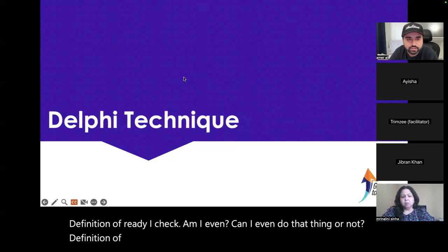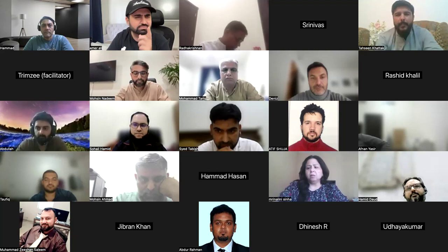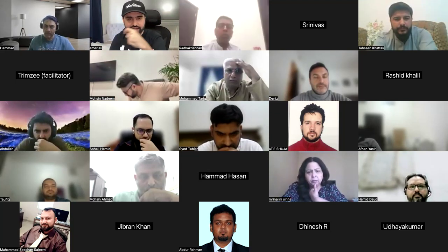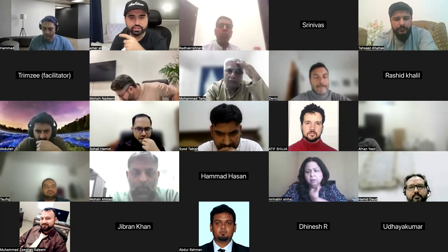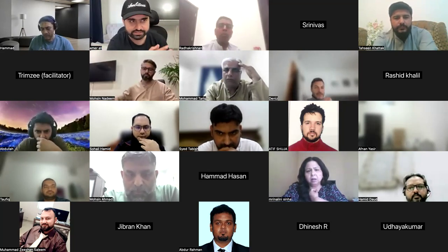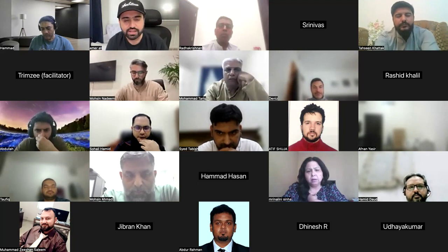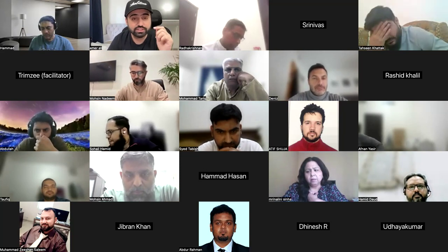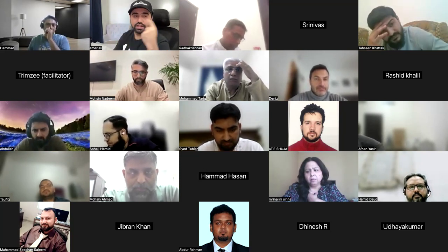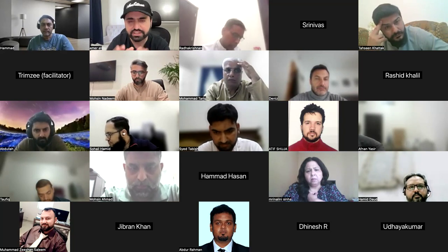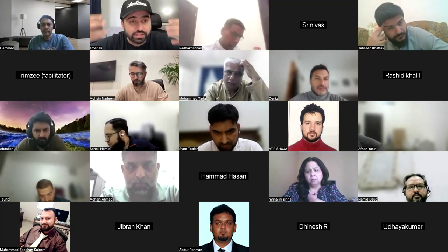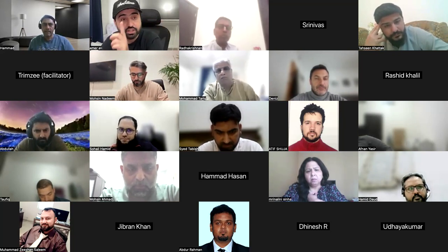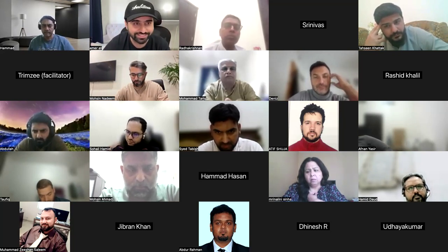Delphi technique. Somebody asked me yesterday about the Delphi technique. Delphi technique is where you go anonymously and ask everyone about it. Anonymously getting the consensus. For example, there is something Hamad feels I may not like. So anonymously getting the consensus from the entire team, that is the Delphi technique. It is also known as wideband Delphi. Delphi or wideband Delphi: anonymous voting.